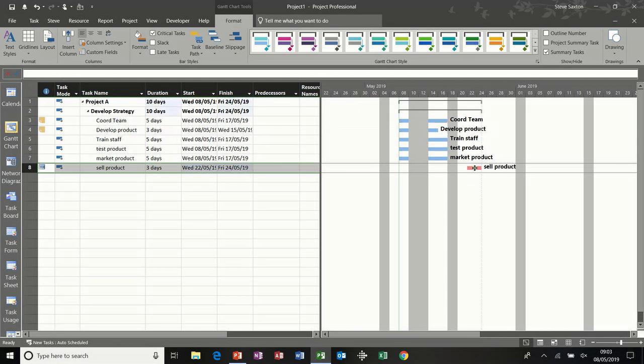Now that's gone red now because that is the only critical task. There's a gap there, so it's showing red. I'll just take that critical off for a minute. Now when I've done that, it's the same as me changing this day manually, so we get the same thing coming up in the information column, a little moderate constraint.